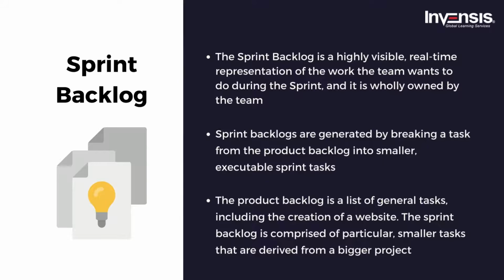However, the development team is not allowed to completely alter the items in a sprint backlog. The team must negotiate with the product owner, product manager, or Scrum Master before making any changes to the sprint backlog. The development team and Scrum Master benefit from this communication. This is due to the fact that rather than fully removing a process, it enables you to uncover strategies that assist to construct smaller, more manageable sections of the process. Sprint backlogs are generated by breaking a task from the product backlog into smaller, executable sprint tasks.